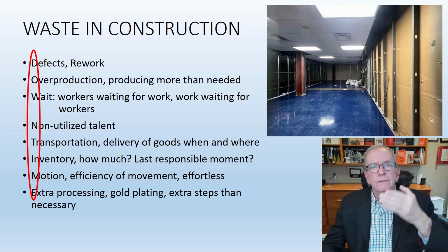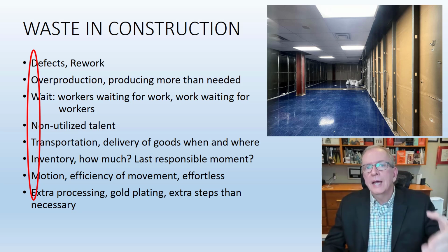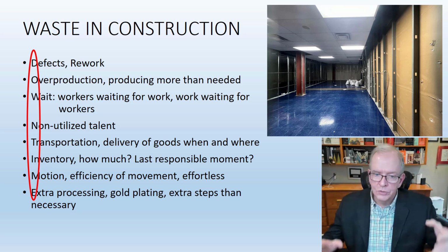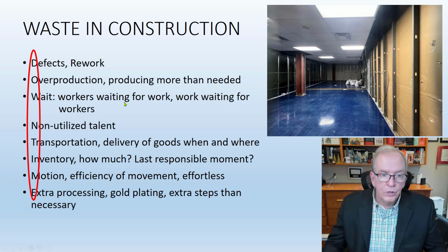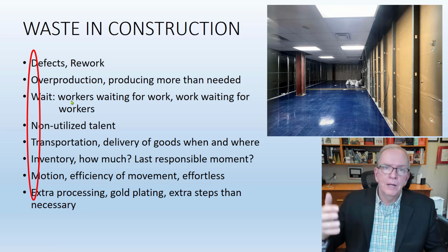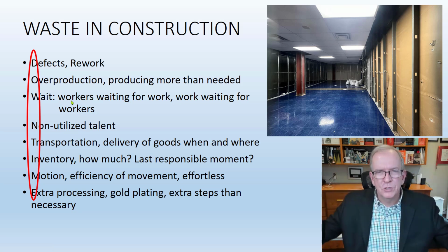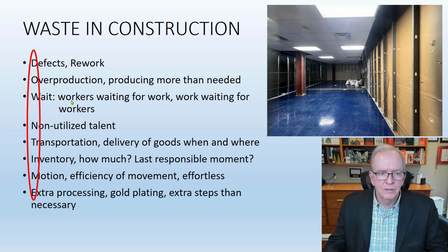You want to have enough lights to stay ahead of the electricians, so the electricians don't have workers waiting for the lights, right? But you don't need that much, especially when it's such big, bulky items. That's something to consider. How big and bulky is it?